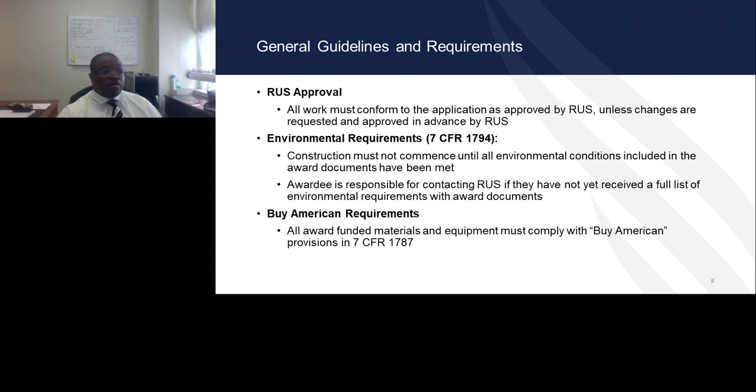For any work, RUS approval is required for any work that departs from the scope of work that was included in the approved application. The work must also be covered by the environmental approval. I think everyone should be familiar with these requirements as part of the application process.